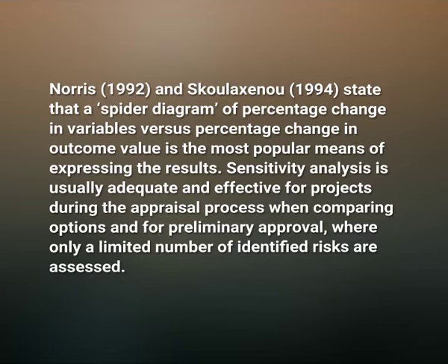Sensitivity analysis is usually adequate and effective for projects during the appraisal process when comparing options and for preliminary approval, where only a limited number of identified risks are assessed.